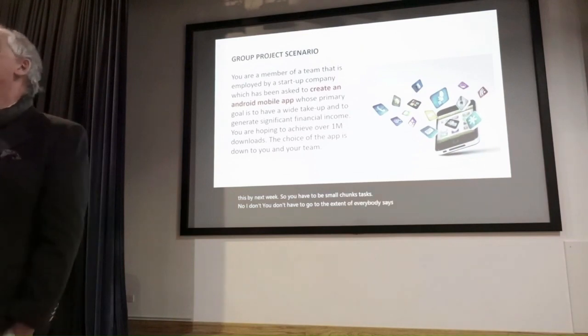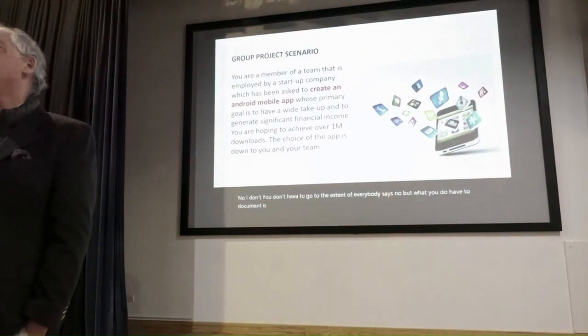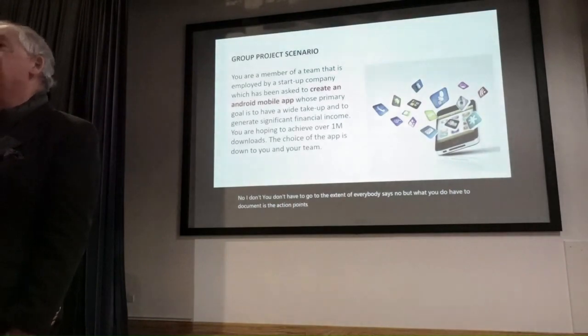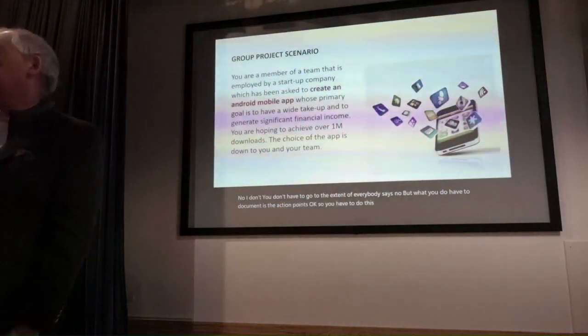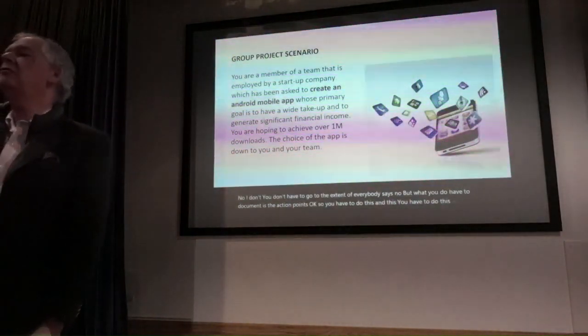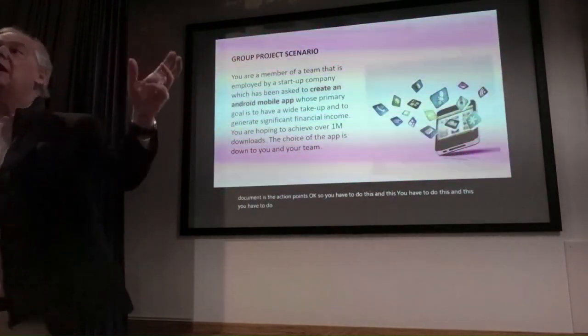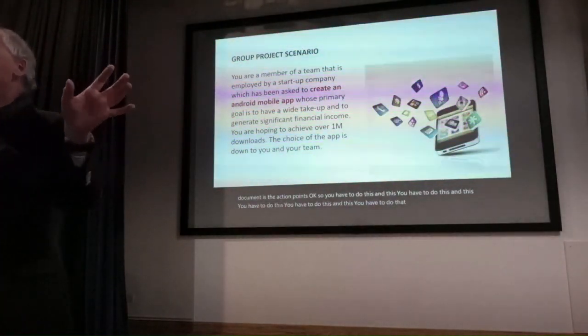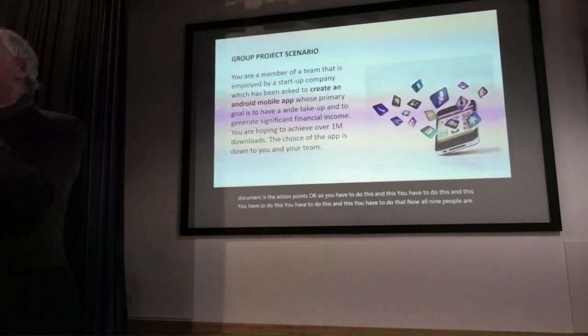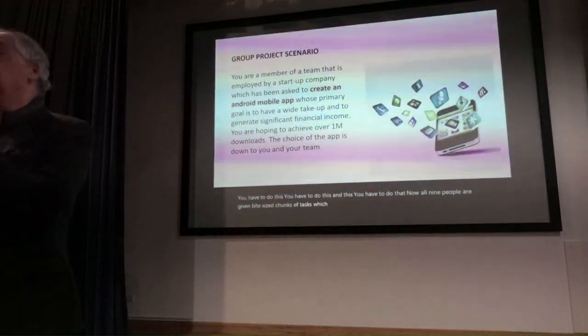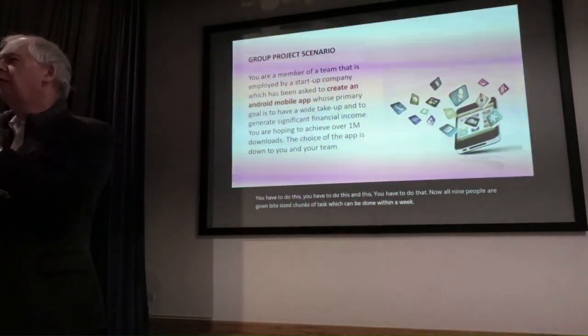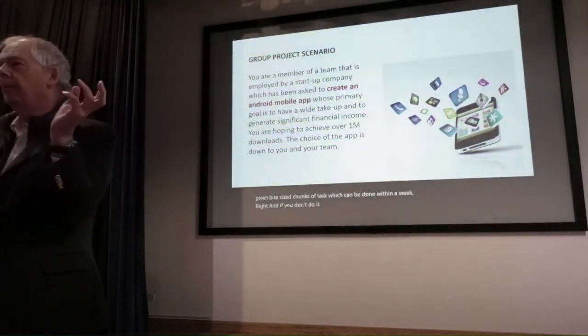But what you do have to document is the action points. So you have to do this, this and this. You have to do this and this. You have to do that and that. All nine people are given bite-sized chunks of tasks which can be done within a week. And if you don't do it that way, you'll find that things slip all over the place.